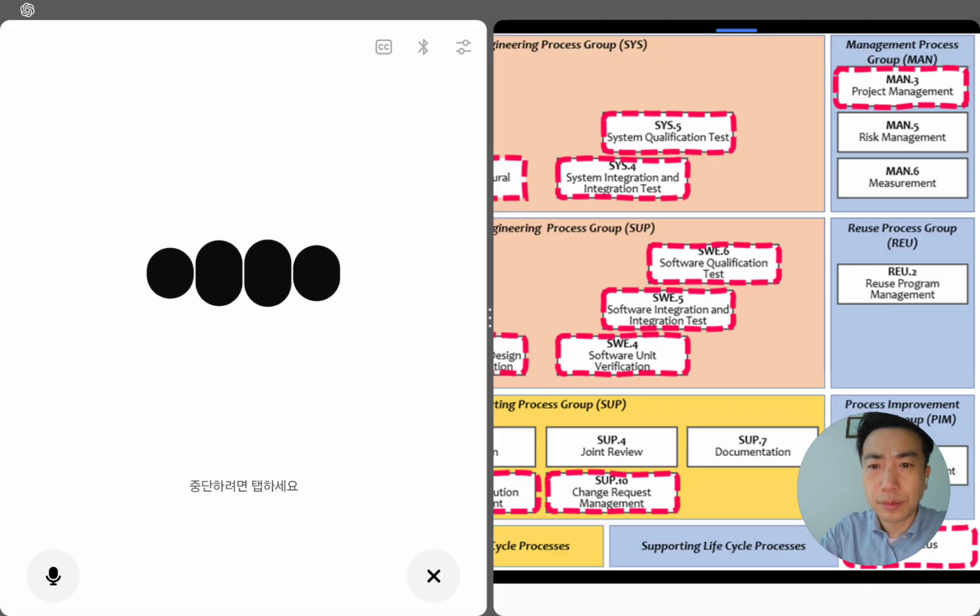PIM.3 lessons learned flow back to improve estimates and checklists. Simple audit story you can tell. Open quote: we tailored V-model with 2 integration waves. Scope and tailoring are in the project plan V1. We update schedule and KPIs weekly in the dashboard DB.